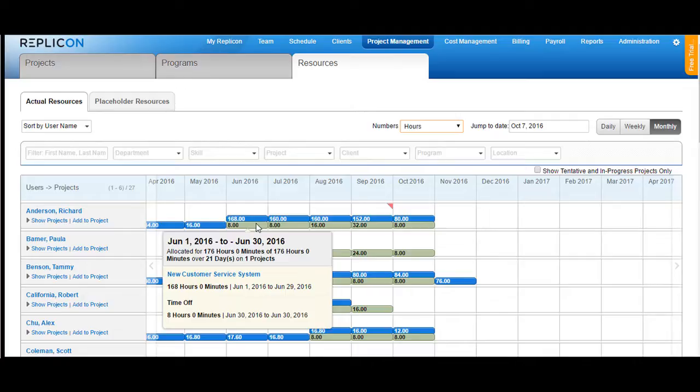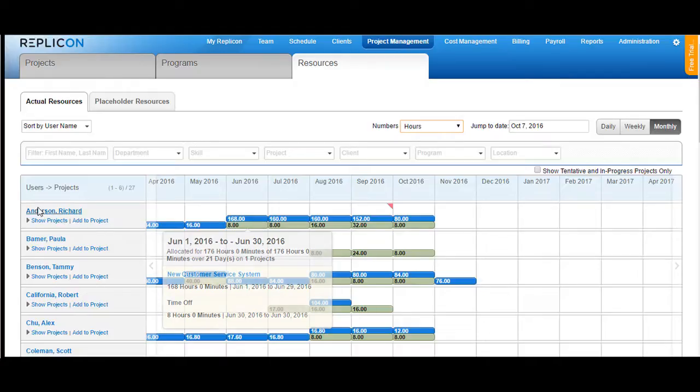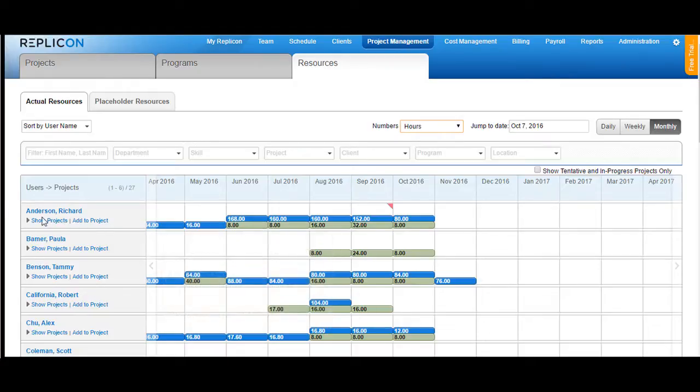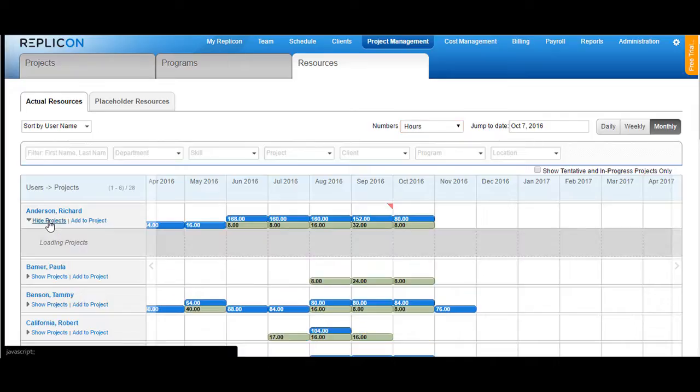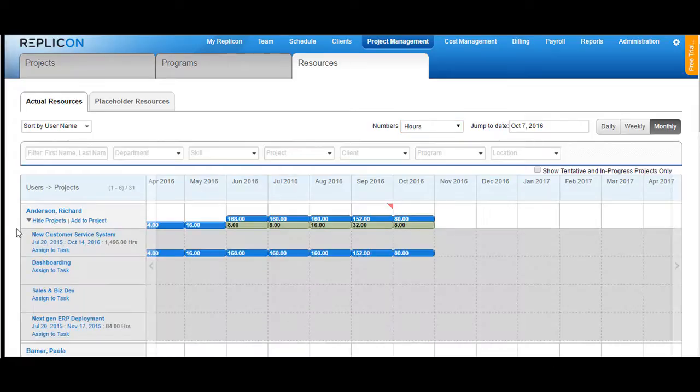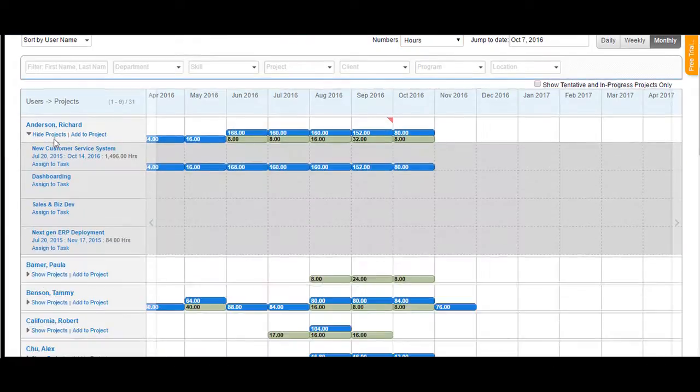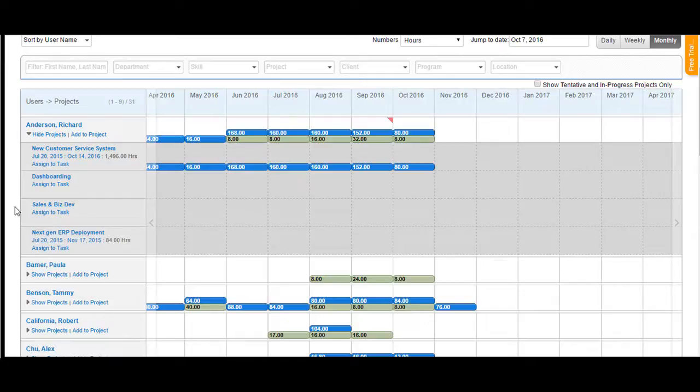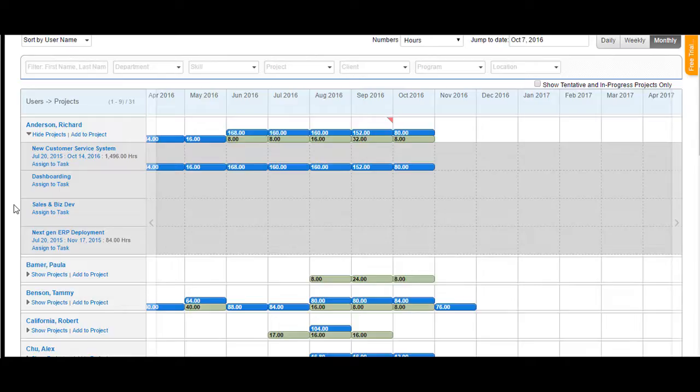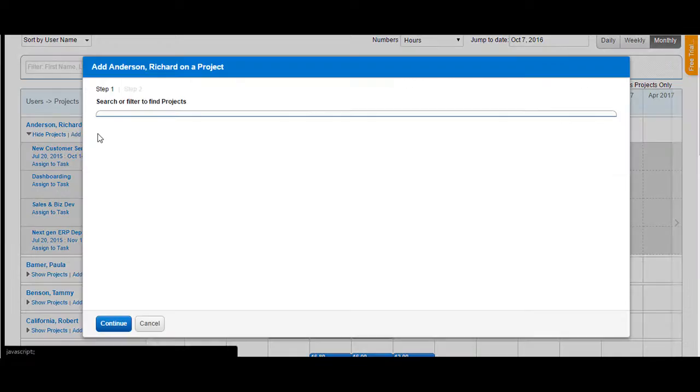Now let's learn about allocating hours to a user as a resource manager. In order to do so, you would see a section called Show Projects here. Click on Show Projects and you would see the list of projects that this user has been assigned to. Take an instance where you would want a user to be assigned to a particular project but you do not see that user added to the project. In that scenario, click on Add to Project first.